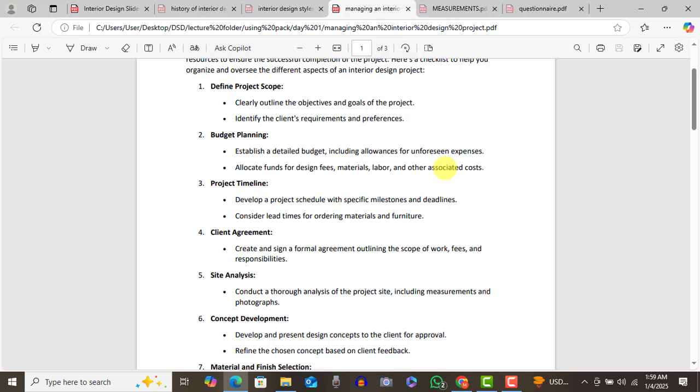We'll get there. We'll talk about all those things. It's serious. You don't need just one team. You don't need just one capital. You need to have 2, 3 carpenters on standby, especially masons, because they disappoint a lot when you need them very urgently. You don't hear from them for 2 weeks. Meanwhile, you have timelines you are working with.